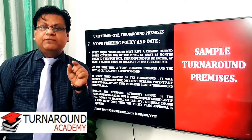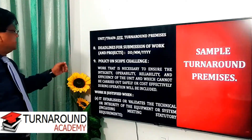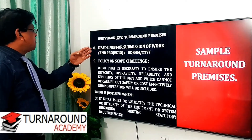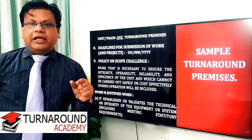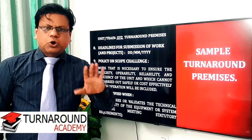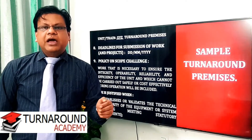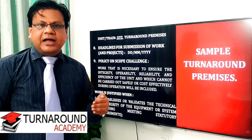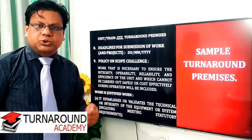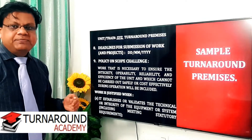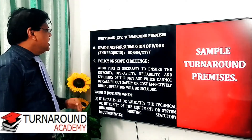Number eight: deadlines for submission of work. Management will decide the cutoff date — after that, no scope will be considered for the turnaround unless it falls under a specific defined category. The turnaround manager is responsible for ensuring material availability and resource availability to address each job submitted by the deadline, and all stakeholders must plan accordingly.